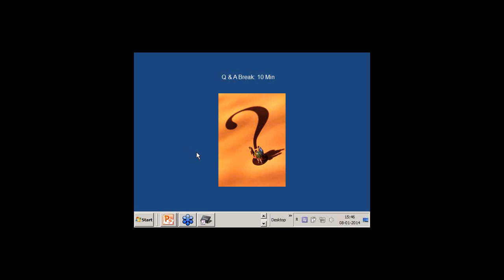Okay, in a pull-based system, how can the manager measure the progress? Should pull-based scheduling create a lot of unfinished tasks? At what point should a task be broken down in pull scheduling to maximize the work finished and not the pending tasks? Now, actually, this is the primary focus. The primary focus of pull-based scheduling is not to create high work-in-progress inventories. The visualization of a task board, the complete monitoring system, is on the basis of end-to-end time. It is not based on "I have started work and then I have held it because there is no one to test it." So we should ensure that things are moving quickly in the development process.